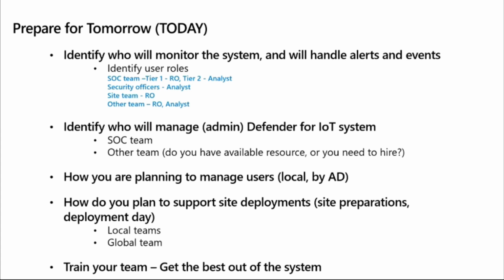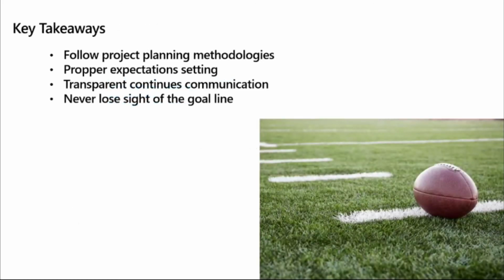If we do this planning ahead of time today, we will also know, once we face a challenge later down the road, how to interact with it. And of course, first and foremost is train your team. Training, constant training. And I must say that also usage. If training goes without usage, and you train the people and they do not use the system within 5 to 7 days, it's obsolete. These are the key factors that you need to take away from this presentation.